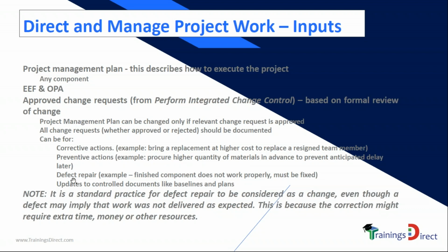Defect fixing. There might have been a flaw in a product, and to correct the flaw, somebody might need more time, more money. They may need some more machinery to fix the defect, new machinery to fix the defect. Therefore, defect repair also becomes a change request. In many companies, we have noticed that the moment there is a defect happening, or a bug, sometimes you call it, it's considered as a change.